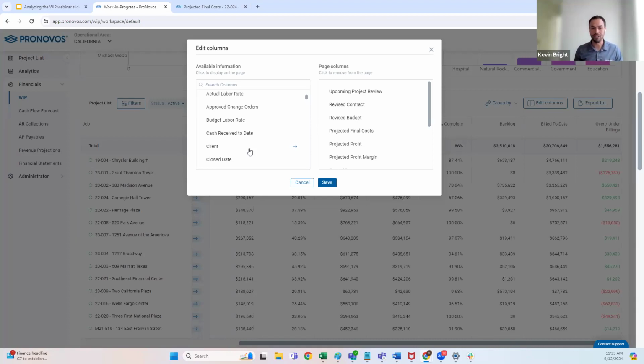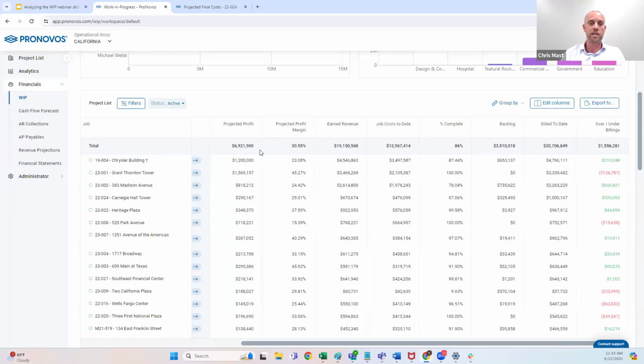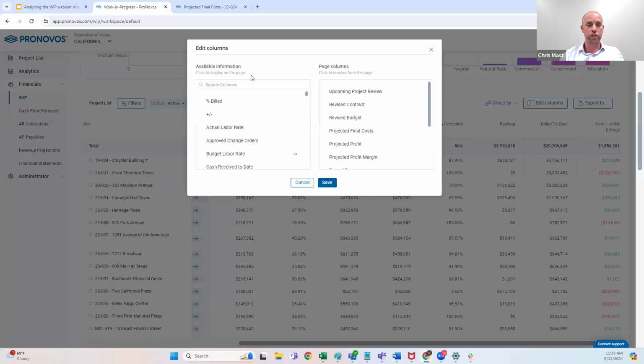So Chris, I don't know if there's any metrics that you would like to see on the WIP or you've seen your clients include, but yeah. I think the biggest thing for me, and the reason I like Pronovos the most, is a WIP schedule in Excel, in the past, could have been great, but the problem is we have to be able to reconcile current year costs and revenue back to the income statement. More often than not, that Excel WIP schedule looks great, but it doesn't reconcile back to anything because you only keep it at the total contract level: total cost to date, total contract to date, total revenue to date. We have to be able to break out what was earned in a prior year versus what was earned in the current year to show that the schedule is complete and accurate in a set of financial statements. So being able to break down those columns can save an immense amount of time. I mean, that's usually where I spend most of my time when I'm doing an audit, is trying to reconcile revenues and costs when, in this case, it's just a drop down.